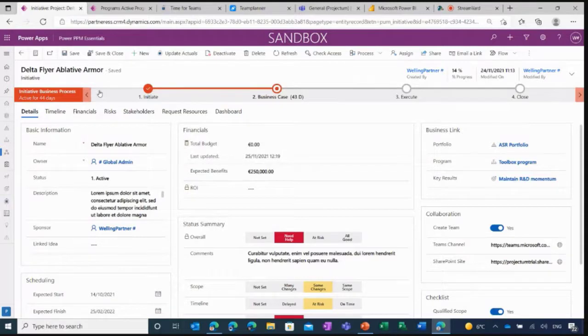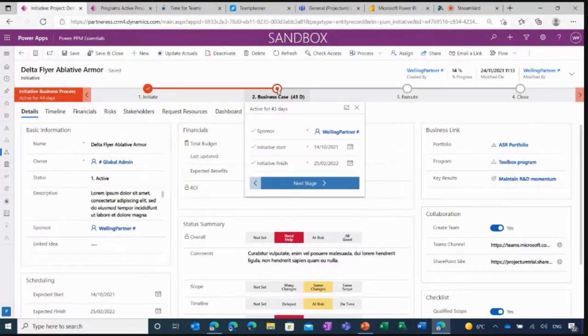So here at the top, we've got a bit of a workflow that shows us the stage gate process linked to this specific project. And it's all interactive. So if I click into one of these stage gates, you can see there's a short checklist that we've had to complete. It's all ticked off in this example because it's been completed. But once I've done this, I can then press on next stage, and that would then fire off to the group of approvers or the approver for them to review and approve, hopefully, so we can move on to the next stage. But the workflows within this, again, they're all developed using Microsoft Power Automate, and they are fully dynamic.